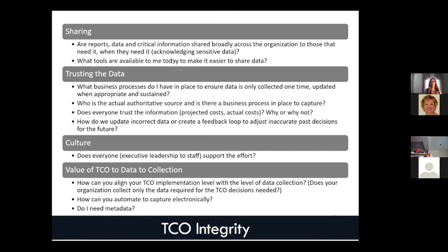And his response was, we have the contractor and the PSP, the people who we hire, they come in and they provide and they input our schedule values where we want them to be set up. And he said his ideal world would be this one touch rule, and he articulated it great. It would be the contractor. Think about schedule values as the contractor goes through construction. They input that directly into the system, and this is his ideal. They don't do that today. They input that directly into the system as the schedule values.